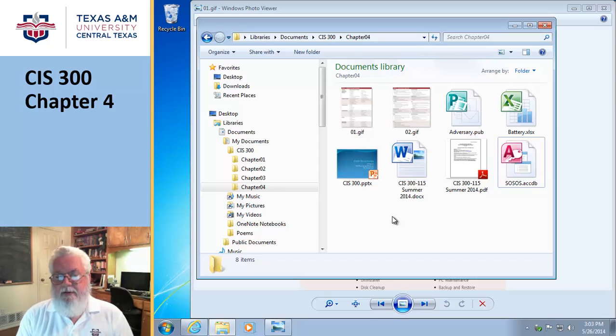It helps people, it's an easy way for them to see what resources are going to be required. Once you've done all that, you can say, my God, in week 41, I need 20 people here to do that task. But in week 42, I only need 5 people here. So, I have to hire and fire, and it allows me to do cost estimates. It's a fantastic piece of software. And once again, we're not going to do that here. But you need to know that it exists.